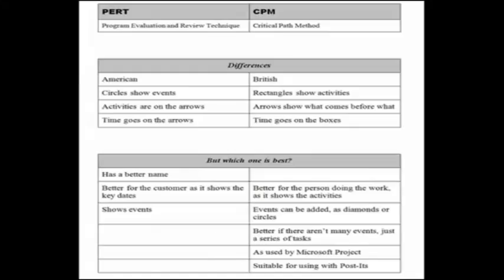So really, if you're choosing between PERT and CPM, it depends whether you want to look at it from the customer's point of view. They usually prefer PERT because they want to know start and finish dates, milestones if you like, or whether you want to look at it from the point of view of the person doing the work, in which case you want to use CPM and focus on the activities to be done.